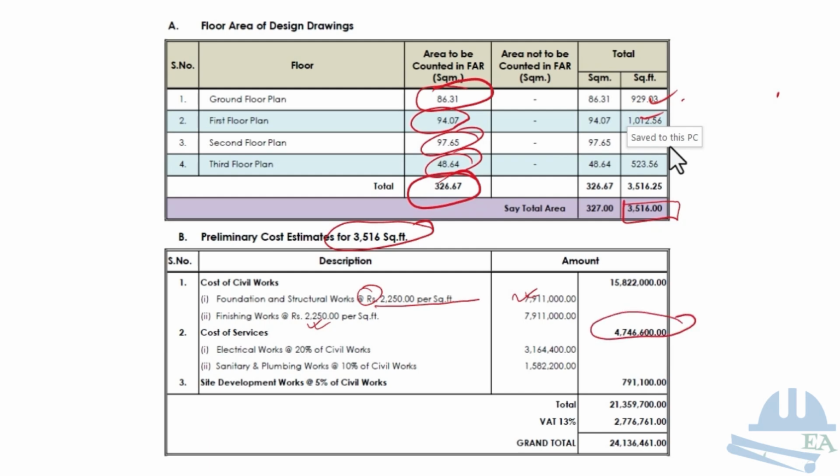But if you do not know it, then you can take help from the local contractor who has been doing these works, and he will give you the per square feet rate. So this is for the estimation purpose only. During the construction, you prepare the BOQ and things, and based on the BOQ and the rate of each item, you get the total cost estimate, and you do the total billing as well.